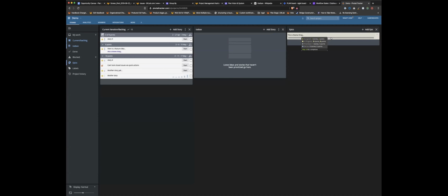And then I literally could get the icebox where all the new stories got dumped. I could organize those into epics. And then you can also drop releases into this timeline view, and they just act as a card. So basically as a product manager, all I had to do was make sure that these were prioritized from 1 to however many. And everything went through a normal workflow where you start, you finish a card, you deliver the card, and then the product manager or whoever the stakeholder is accepts or rejects it.